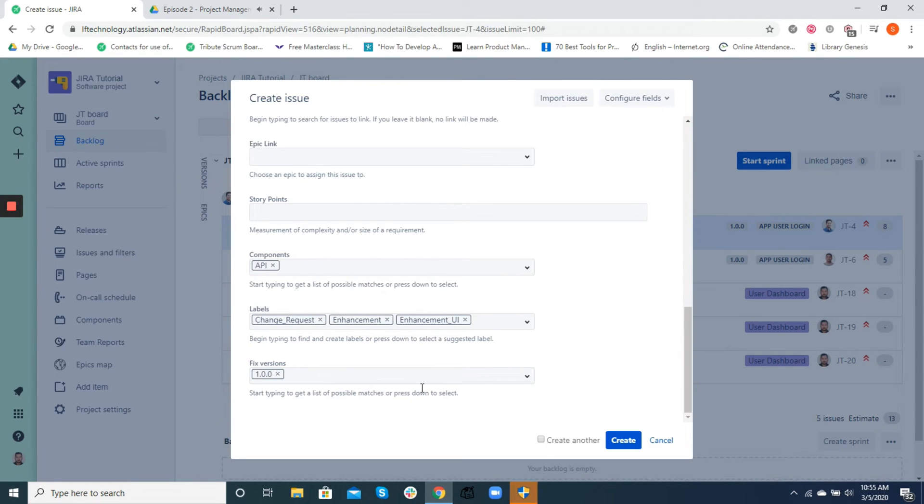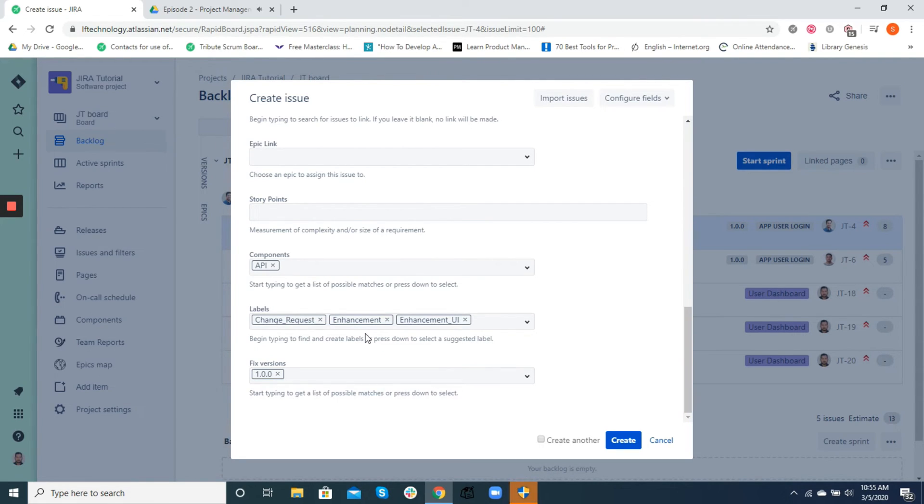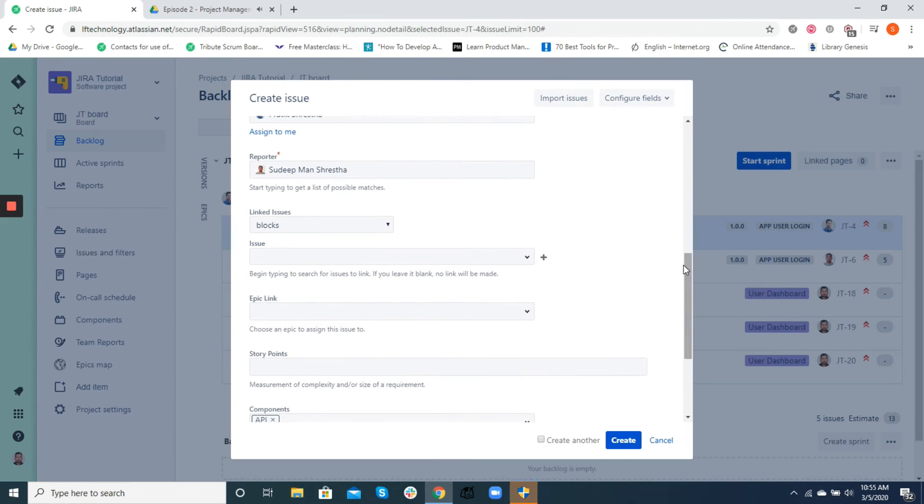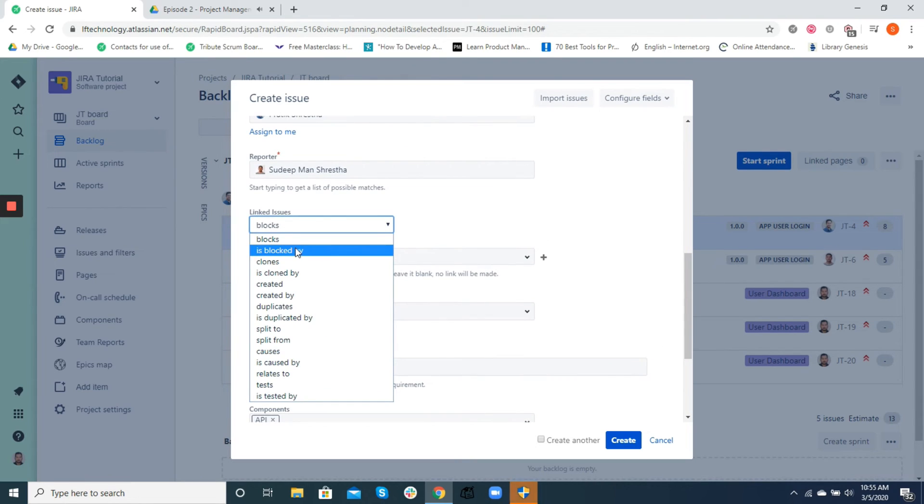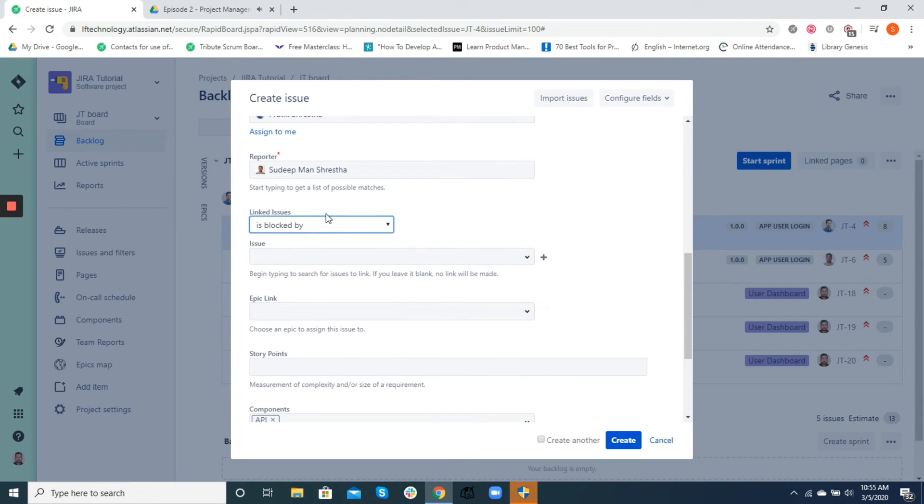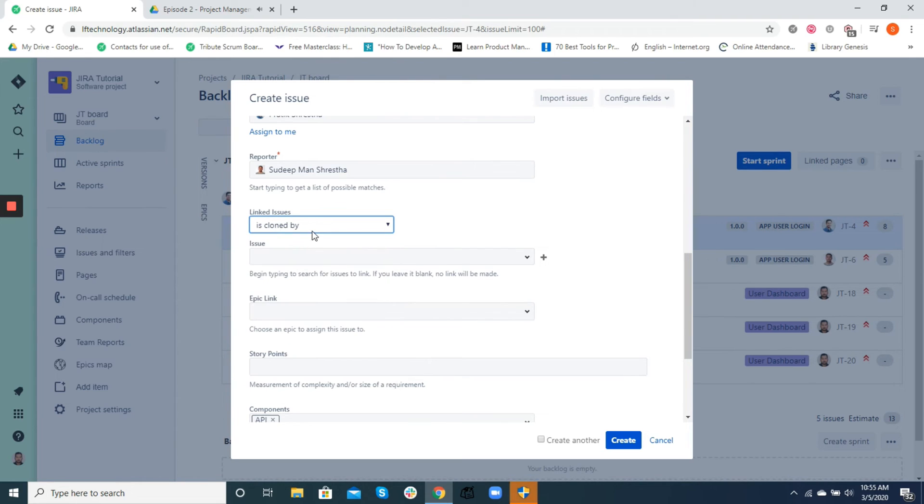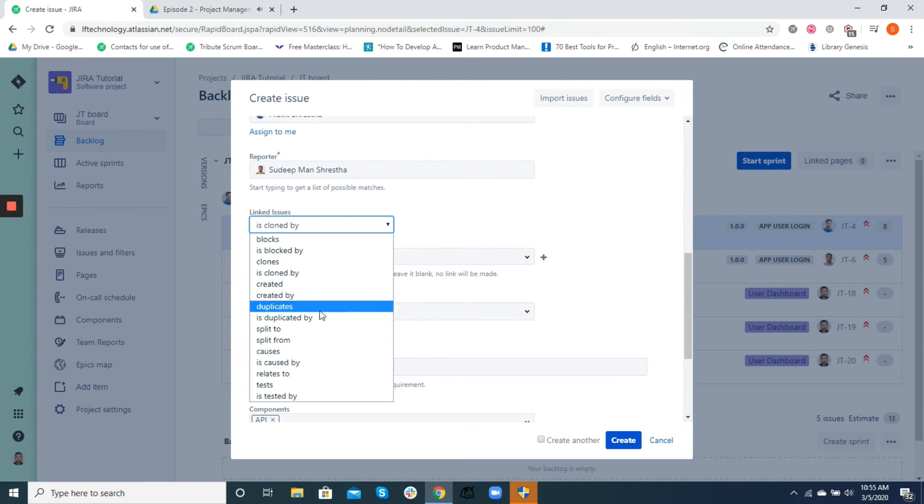Sometimes a ticket or an issue might be dependent on other tickets or issues. An API task may be a blocker to a UI task. A design component task may be related to other design tasks, which might also use the same component. Therefore, to identify these relations in Jira, we make use of the linked issues field to add such tickets underneath the object ticket.